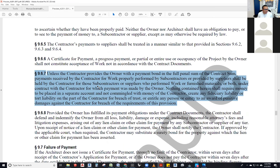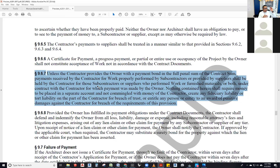That's why it was taking so long to finish day 201 — I like to show you the sequence of how things work. We have submittal schedules that show you all the things to come, given to you as the architect from the contractor. One of the submittals is a schedule of values — a document that tells you what everything costs, so you know where the numbers are coming from. It's how you certify a payment, which is your duty as the architect — whether in full, rejected, or a portion of it.